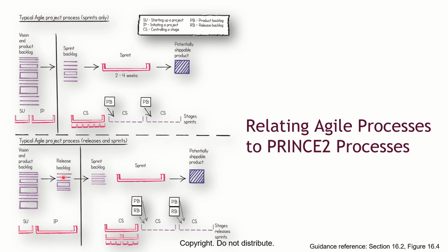For example, it is a 20-story building, but they want you within 3 months to finish up the ground floor or the first 2 floors so that the company can start using the first 2 floors while you continue building on top, or they want to use the ground floor maybe as a warehouse. They just want to start making use of it. So they want you to release. So you prioritize what are those things you can release. And those releases too will follow a backlog.